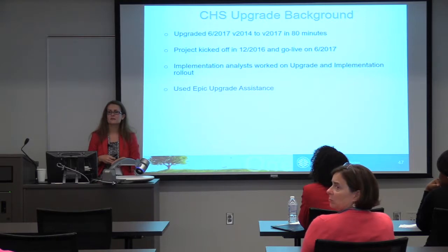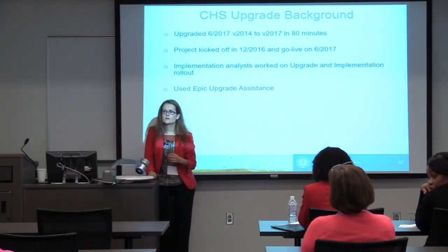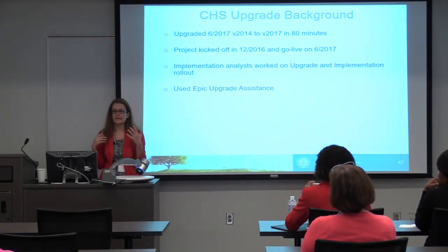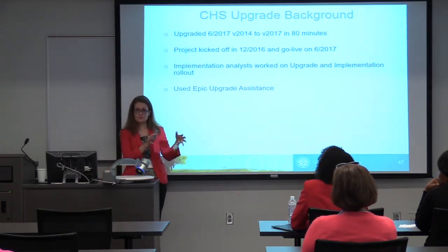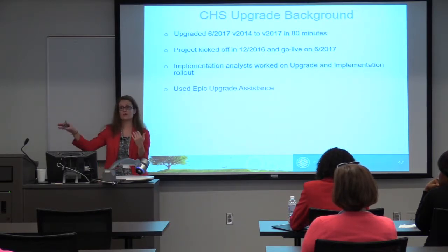So did y'all, I take it y'all upgraded strictly in the Epic manner? In other words, any changes you made related to CHS you found very fairly to the workflow only? Or, can you ask your question again? Did y'all customize Epic any? Oh, absolutely. As much as they tell you they will not customize, we had to customize, and one of the biggest reasons was not because of the Rev Access workflow, but because of our clinical system, because that integration with Cerner is so complex that we've had to do a lot of customizations to make what's going outbound of Epic work for what our clinical system needs.